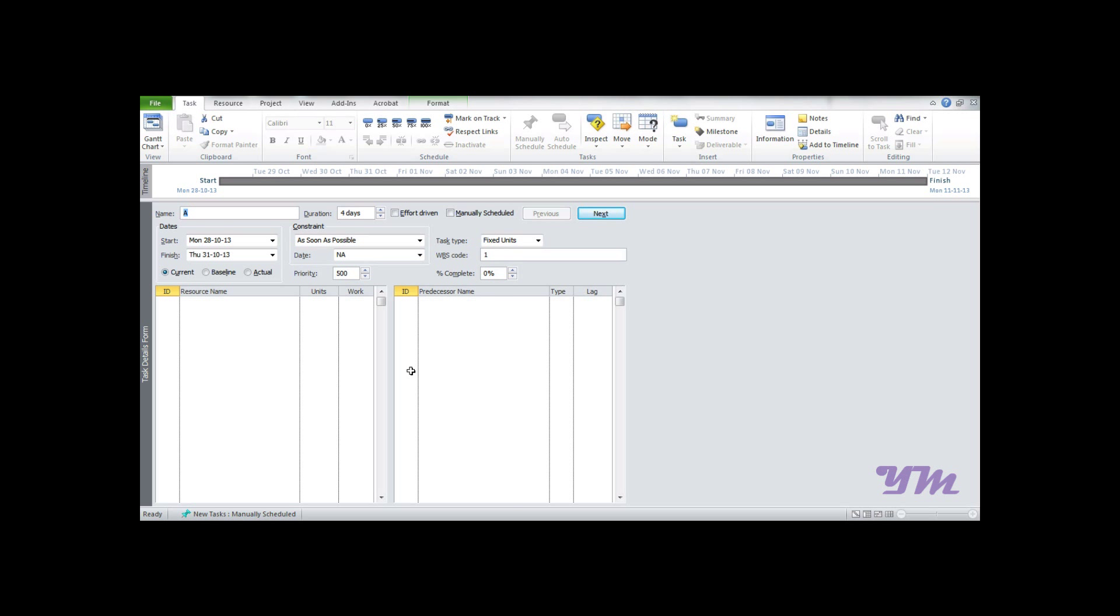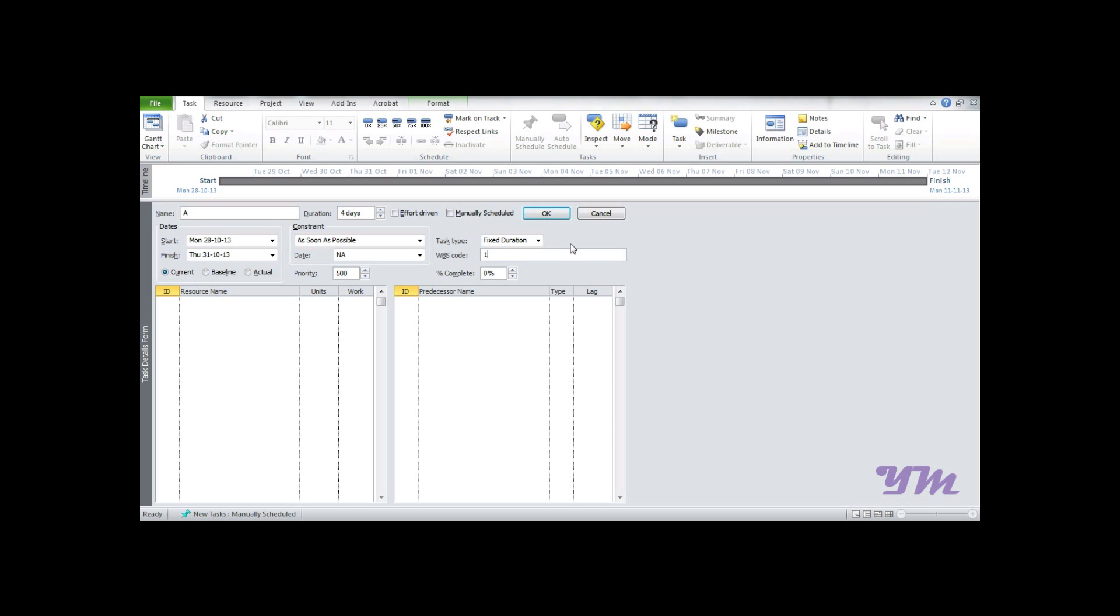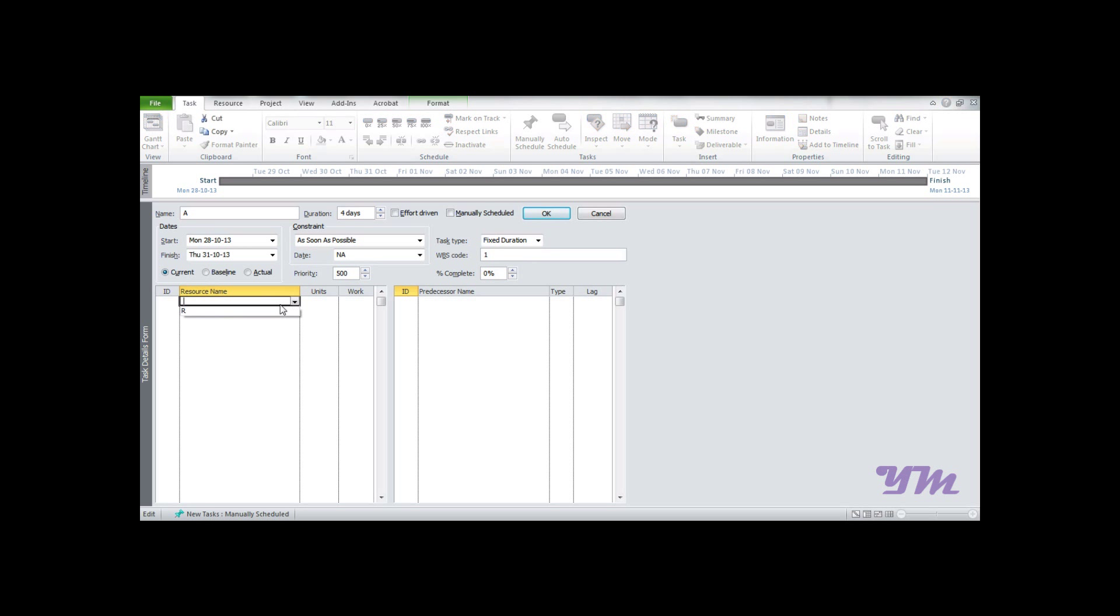The key points: always enter tasks and assign resources to tasks in Task Detail Form. Note that Effort Driven is always deselected, and task type should always be fixed to Fixed Duration. This prevents altering the task duration when we do leveling or other functions. To task A, we want to assign resource R.